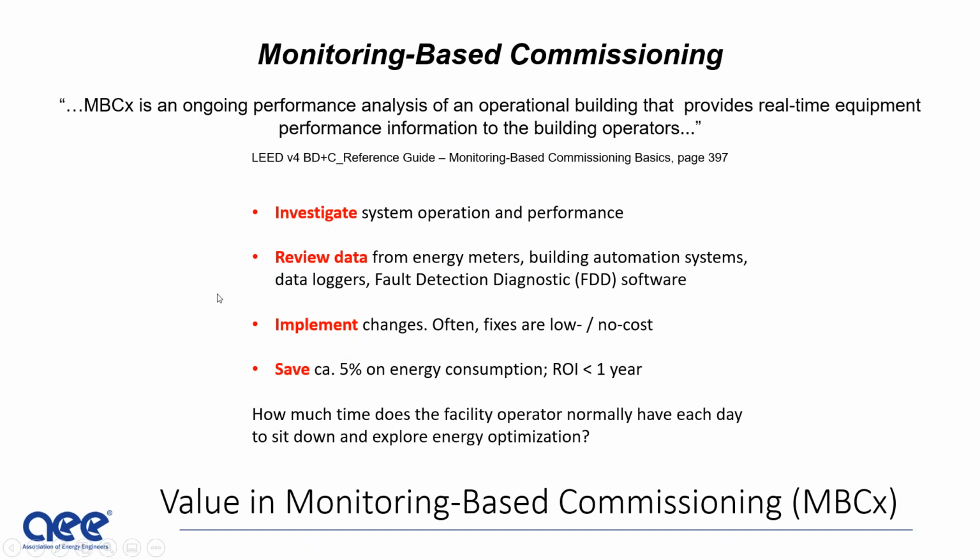In general, I've listed the general steps to monitoring-based commissioning here. Investigate the system in operation and get to know what you have and what you have to work with. See what data you have available, analyze it, review it, and implement the changes.